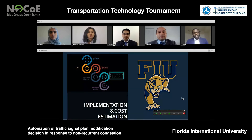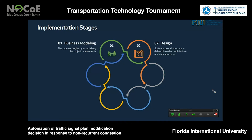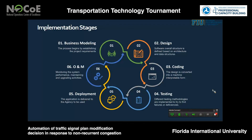Now let's talk about the deployment strategy and cost estimation. Our deployment strategy is based on two phases. Phase one starts at the beginning of the project and ends at software deployment, covering five modules over a duration of six months: business model, software design, coding, quality assurance testing, and final deployment. Phase two starts from deployment through project maturation, with a duration of five years, focused on maintenance, operations, and monitoring of the software.